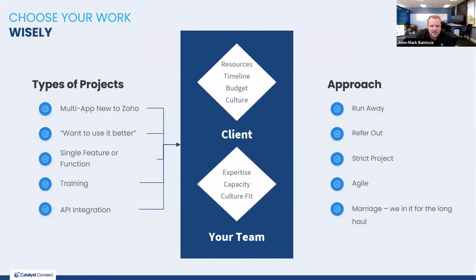Those pieces that are iffy, where the scope is ambiguous, or it's a new API integration where we don't know what kind of support we're going to get from a third party, we typically try to carve those out into a separate scope of work. Get a lock on your MVP. What is it that we can knock out of the park and really have a smooth phase 1, and then push the ambiguous pieces to a subsequent phase?